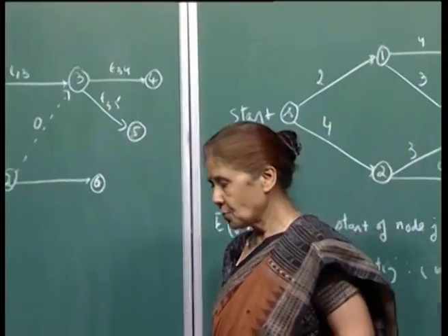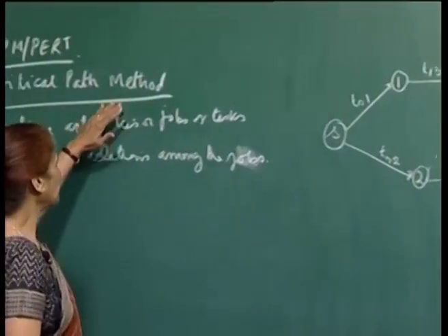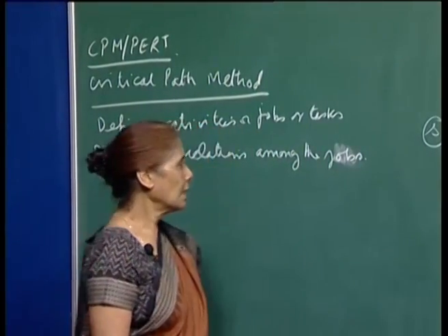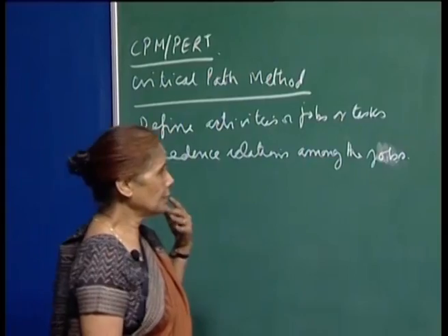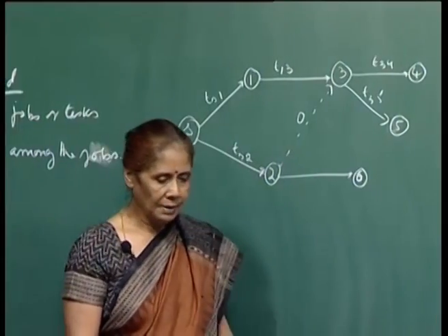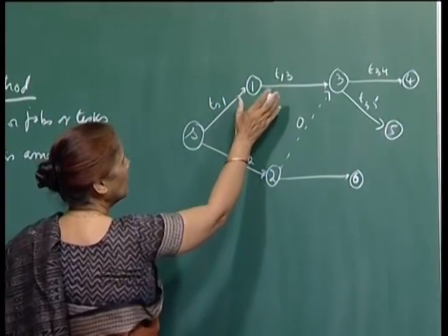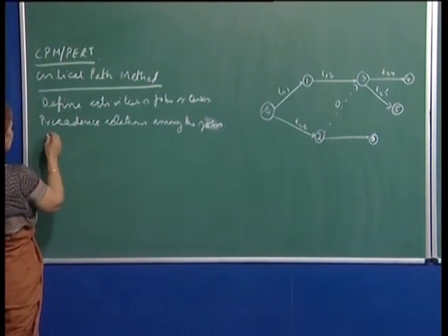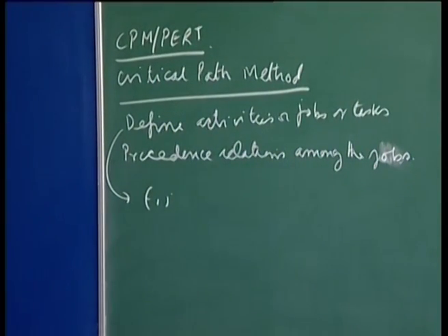We know exactly what resources, how much time and so on the jobs will require. And so, here critical path method is mostly used for situations where things are very deterministic. Okay. So, precedence relations among the jobs are required, and I would like to use the presentation for these critical path method problems by saying that, for example, a job or an activity will get denoted by a pair of nodes, right. So, for example, first of all, when you define, I represent the job ij.